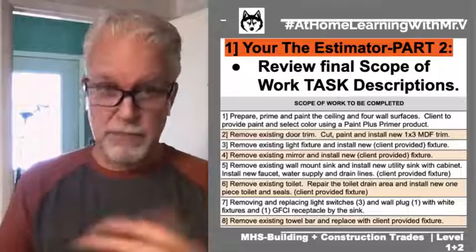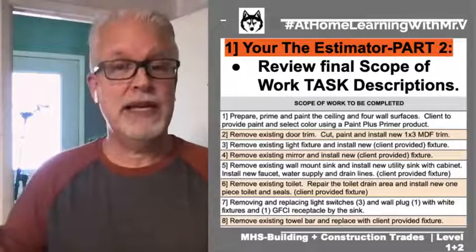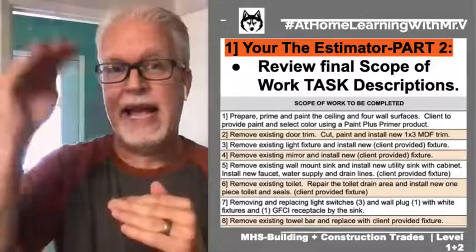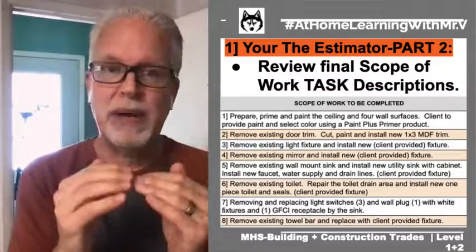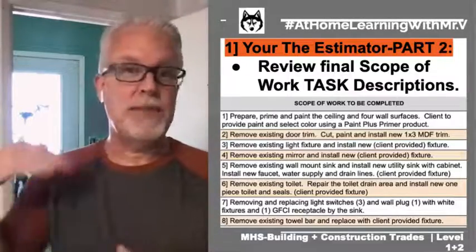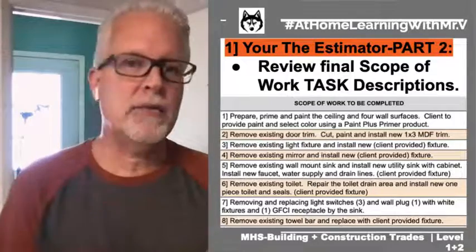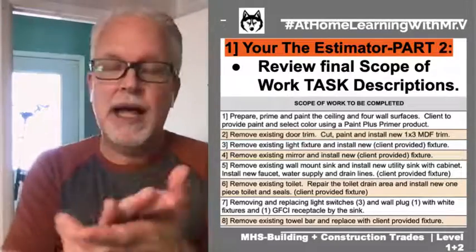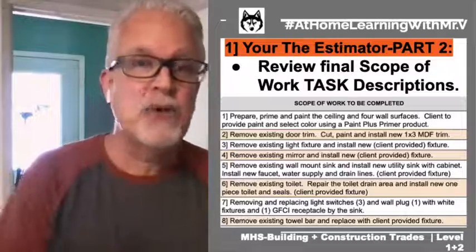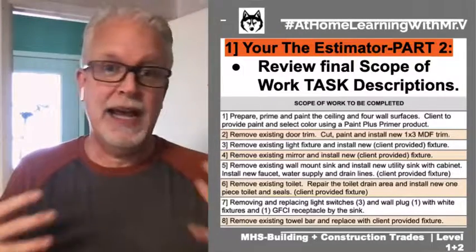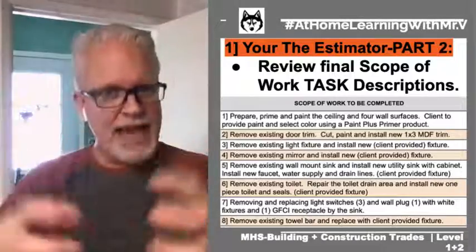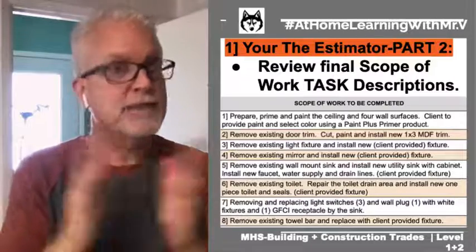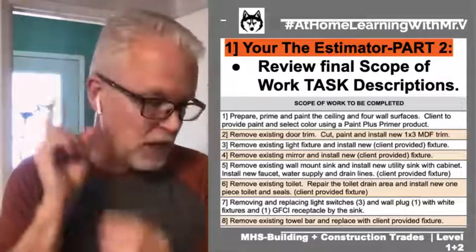Okay, I'm going to put another 3 hours, maybe 5 hours in a project that's going to be 2 or 3 weeks long, because I do not want to give an estimate that is too low in the time budget, so that I, as the technician, feel like I'm always pressured to make sure I hit that time, and I've got to run and rush, and I don't have any time to take a sip of water or talk to the client or whatever, because I'm on a deadline, baby. I've got to get this thing done in 2.5 hours, or I'm off budget and my boss is going to be upset, right? So that's the thought process, and then ultimately trying to create an estimate that gives us enough time to really get the job done well. So that's what's cooking there.